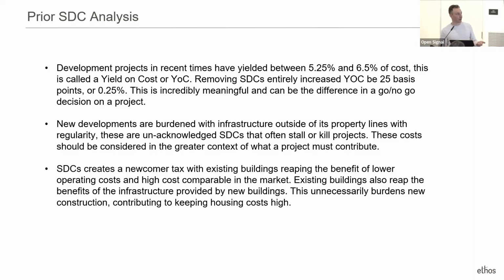So local jurisdictions will also often say, well, your building is affecting the nearby intersection in a certain way, change it. And there's not much leverage for one project or one developer to argue with them. So you eat the 120 grand. That's also an SDC, right? It is literally the same thing. It is the effect that your building is having on the infrastructure nearby. So there's a lot of double dipping that happens, and it sort of flies under the radar.